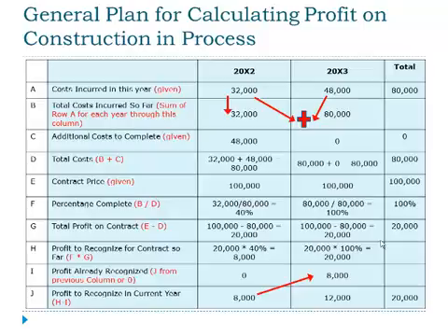Row E is given information. What is the contract price? Here we're going to assume it remains the same across these two periods. That now gives us enough information to calculate our percentage complete. B divided by D. So it's the total costs incurred so far divided by our total estimated costs.